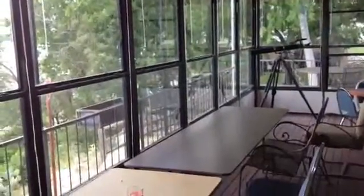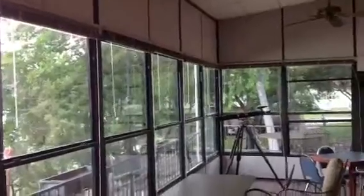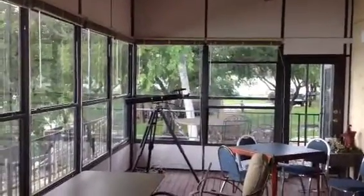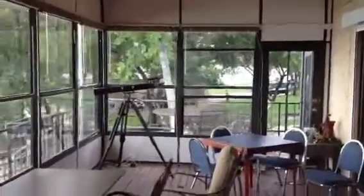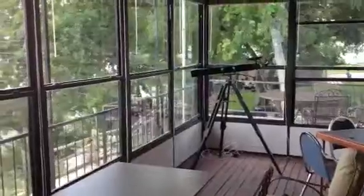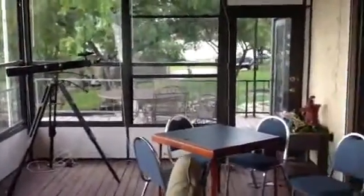Now the problem is that we have this wall framing. Well, it's not really wall framing. We have this wall that's basically just an aluminum construction. It's 2 3/4 inches wide now, which is not wide enough for our windows. So what has to be done is obviously some framing around the upper and lower wall space that the window opening is in. So that's what we're looking at as far as scope of work: increasing the wall thickness to accommodate our window, resheathing the outside with Hardie Plank, and then an interior substrate inside the sunroom to accommodate the width of our new window.